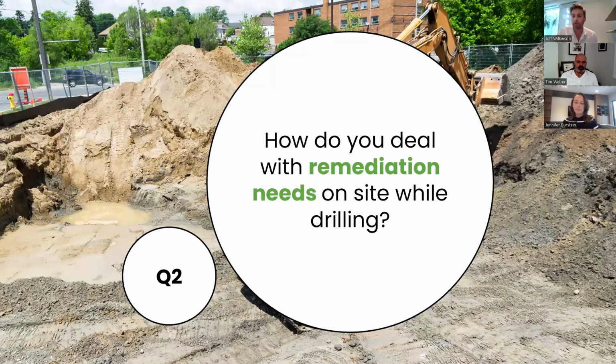I guess in my experience so far, what I would prefer depends on whether it's an infill site or a greenfield site, well, not greenfield if it's contaminated, but an open site. If it's an infill site, it works a lot better if the owner can advance their demolition permit, demolish whatever structures are on the site, and then potentially deal with that remediation ahead of you guys actually showing up.